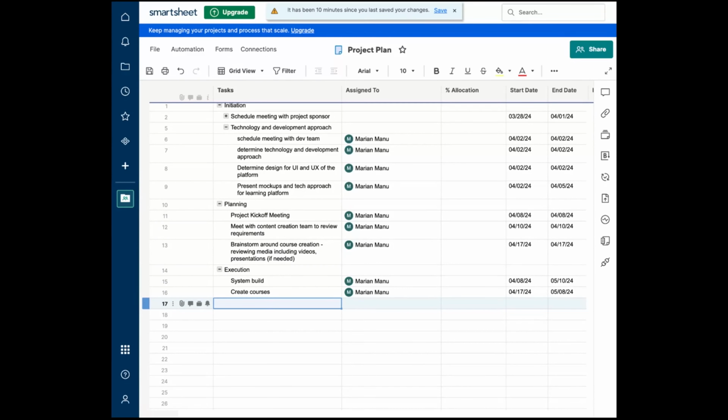It should have been completed at this point. All throughout these 5 weeks, we're checking in with them. So we should be ready for testing at this point. So this is where we do UAT, user acceptance testing.